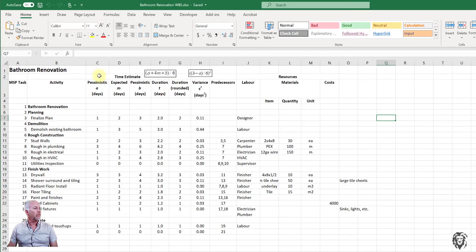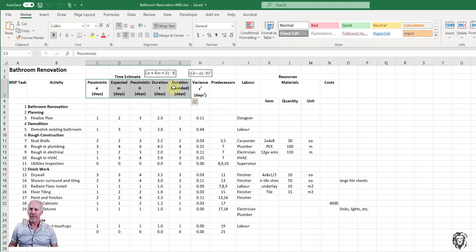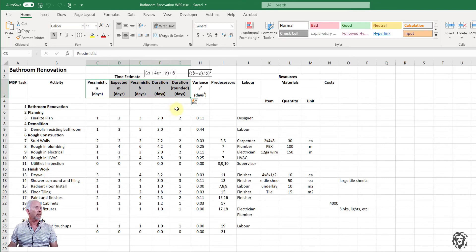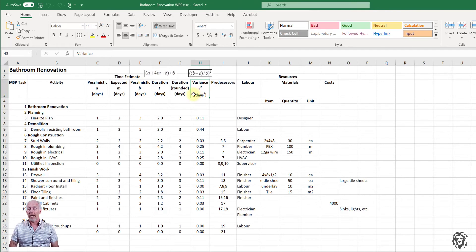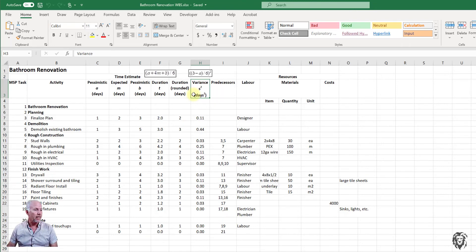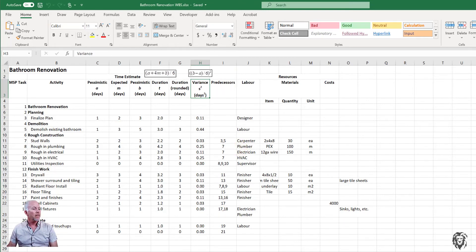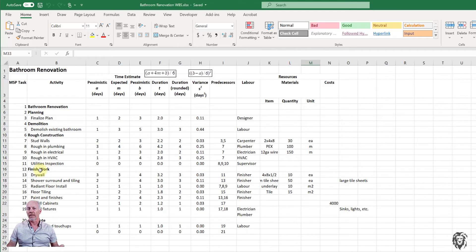And we see our tasks are listed here. And then I use the power of Excel to basically do a PERT calculation. Now, you can do this in Microsoft Project with some limitations. And I'll show you how to do that on a separate video. I'll throw a link either up here or down below in the information so that you can go look for that when you want to. But it's really, really easy to do in Excel. And then I can go on and do variance analysis for the time estimates so that I can get a probability assessment as to how long, whether it's going to be finished by a certain date or not and predecessors and resources and cost estimating. And it's really, really easy to do in Excel. So what's really nice is it's also very easy to take the information that's here and transfer it directly into Microsoft Project.